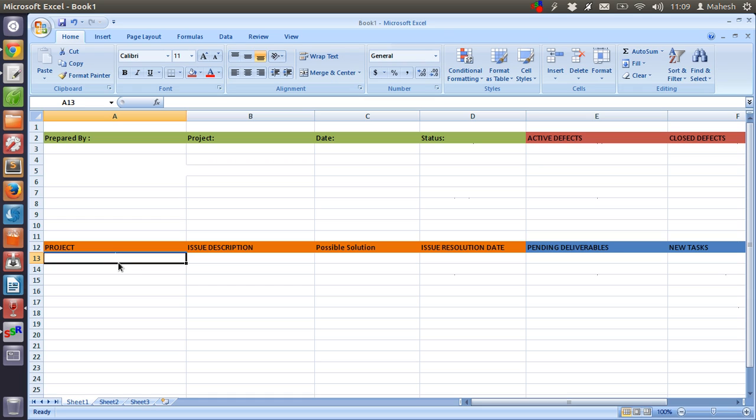Here you have to write the project task, then issue description, then possible solution that you think should be for the task, then issue resolution date. So you have to fill up this table and keep track of your weekly accomplishments.